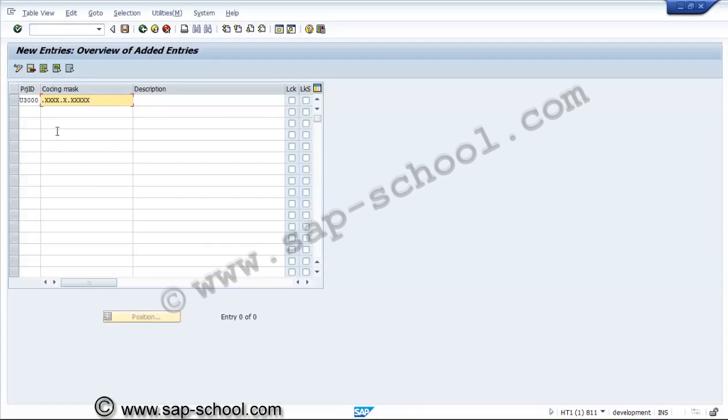Then if required, we can leave one more character for sublining. So we can redefine this. In the first level, the 4 characters we are using: first 2 for the fiscal year and next 2 for the serial number in that fiscal year.